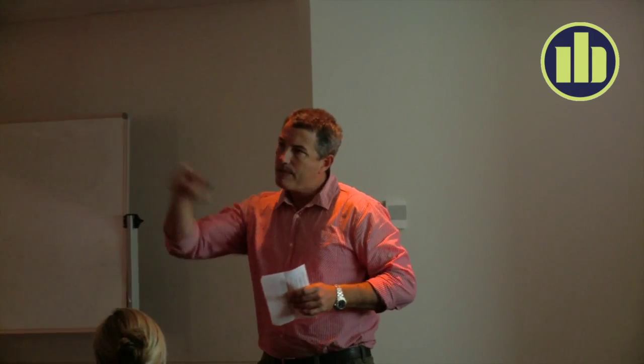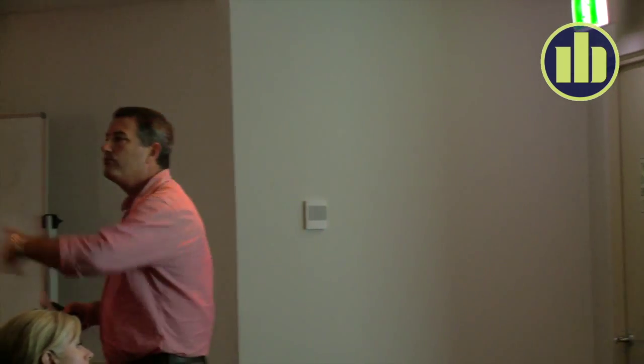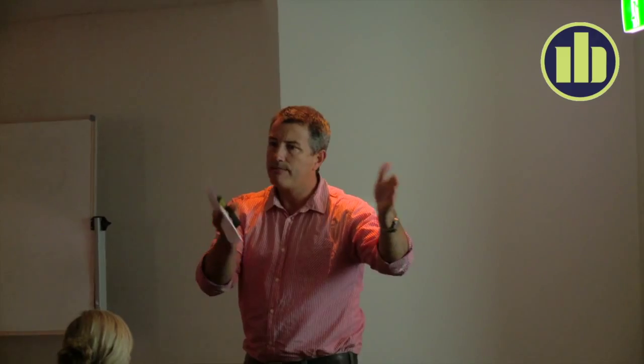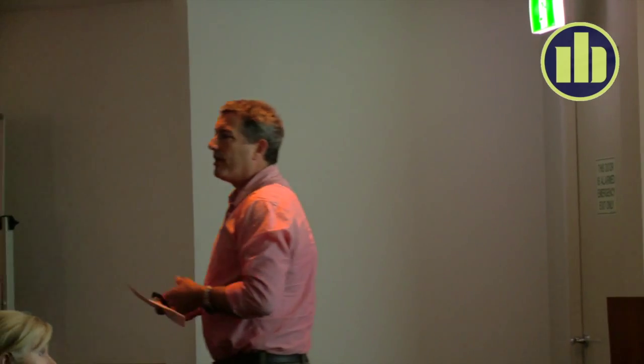Nowadays, because we can map it at whatever level we want, it doesn't matter. When we're looking at detail, if a subcontractor that's doing the formwork wants to know the quantity of formwork in the different types of column sizes, you can drive that out of the same map. So the idea is the map starts off a general sort of map, and it gets more detailed. You work on it more and more and more, so that ultimately it's answering the question across a project of whatever a quantity is.